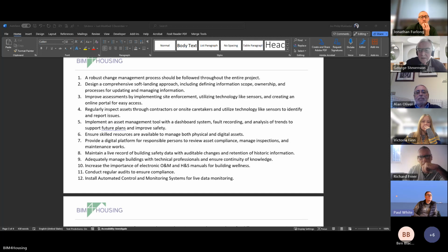I think, sorry, George, I think it comes down to who's actually responsible for these drawings, and is it one of the contractors? Is it one of the consultants? But the point is whatever you have at Gateway 2, whatever those drawings are, that's what you're building. And if you don't build that, then you've got to have proper change control. And it doesn't matter who it is, you're in that process now. So it depends on who's responsible for keeping those up to date. And that's the whole key to this whole system, is you build what you've been told. And if you don't build what you've been told, you've got the change route.